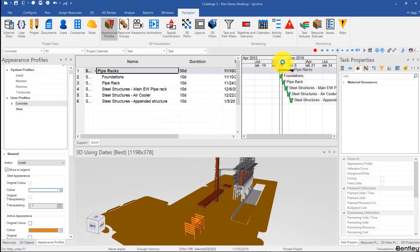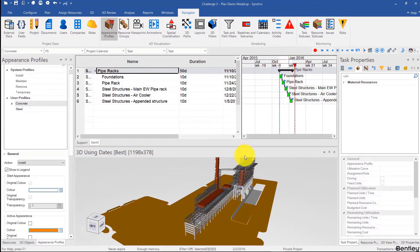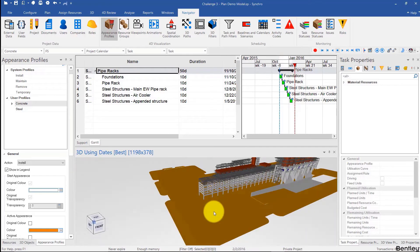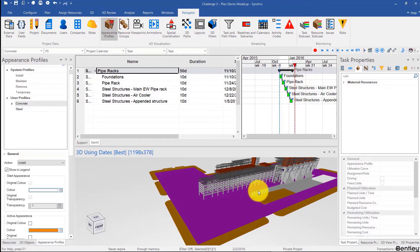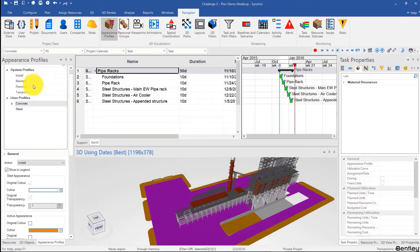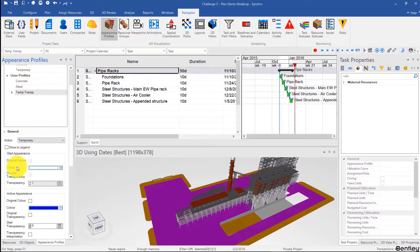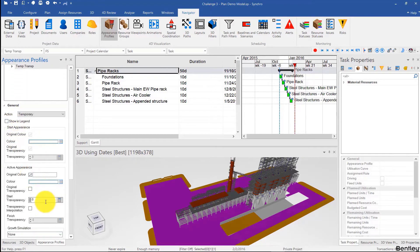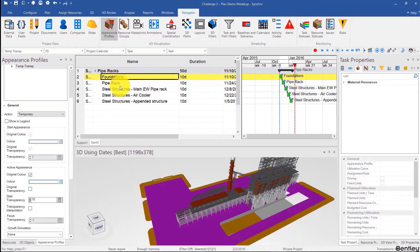I can just scrub the focus time to make sure this is happening correctly. Now what I like to do is create a new appearance profile for that platform over here, and set that to be transparent while the foundation activities are going on, so I can see what's being worked on without having to look from the bottom every time. So I'll right-click, add temporary, and call that 'temp transp'.